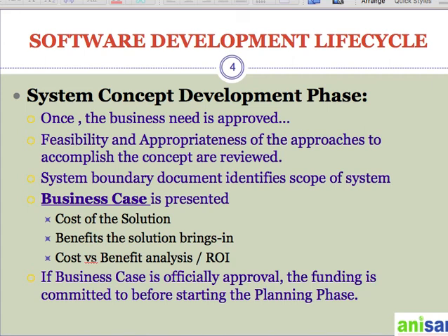In addition, the business analyst, project manager and the stakeholders need to justify the investment in the solution by providing detailed calculations on profitability and return on investment, payback period or break-even calculations. Okay. So these are the various factors you need to consider before you build your business case. At this stage we prepare the business case by defining the cost versus benefit analysis, and also considering all the risks we have identified, and see what the benefit versus risk analysis is.